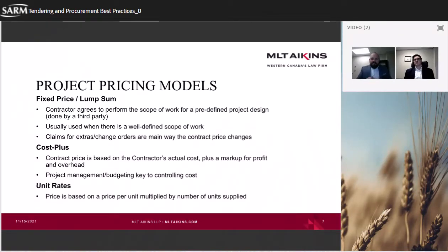The secondary main issue that we see on cost plus projects is often the debate as to what is true cost. When we're using labor rates, do those labor rates represent cost and have appropriate burdens built in? But is there also overhead and profit built into these labor rates, or the material costs or the equipment costs? Or are we finding situations where the contractor's double dipping on those? And so it's all about ensuring that your procurement strategy leads to a fair measuring of these normalized costs for an apples to apples comparison.